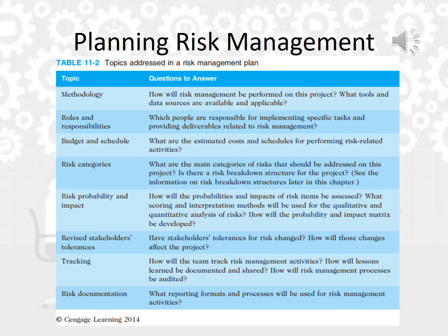For instance, methodology. Here we will have 2 questions. How will risk management be performed on this project? That's the first question. And the second one, what tools and data sources are available and applicable? The developer team, during the meetings I mentioned in the previous slide, should answer all these questions, and the information that they can get from answering all these questions will help in creating the template of the risk management plan.